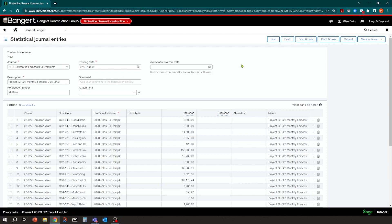But this method is very effective. What's really nice about it is the ability to report back. You can see a snapshot of what your forecasts were a month ago, two months ago, run some statistics on that. Where was this big change? Last month you projected we were going to make money. Now we're in the hole, what happened, and you can focus on that based on that information. So, I hope this was helpful. This is one of many methods to do this type of information in the system using statistical accounts for forecasting, among other things is a really great tool in the system. Thank you.